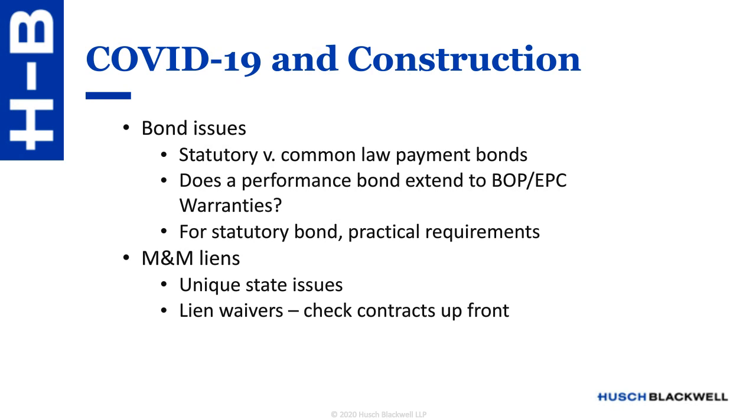We had a client in that circumstance where it was a good construction contract, good bond, good surety, everything was in place, except that there were a lot of notice provisions, waiting periods and meetings that were required, really lengthening the process of exercising on the bond. So it made it difficult for the client to utilize that in an expeditious manner.